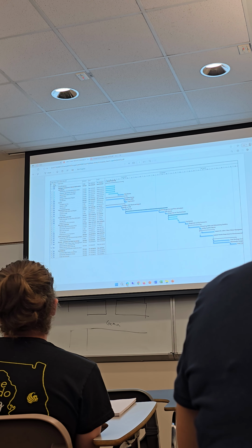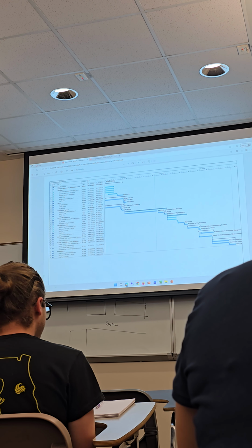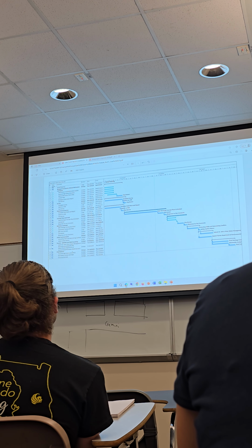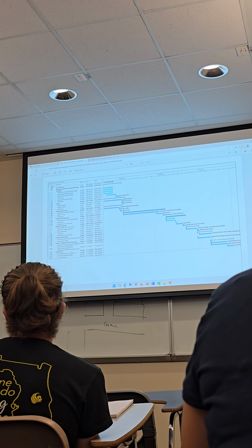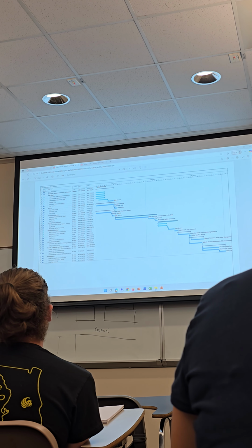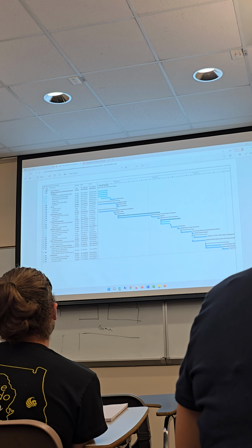You need to have some sort of concept plan, right? And you gotta have what else? Survey and geotechnical. Yeah, you gotta have all those things. So when you're thinking about how this thing pieces together, you have to think about the sequence of that.